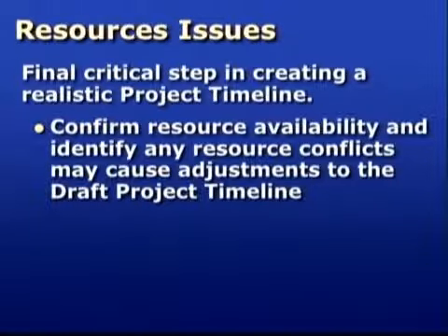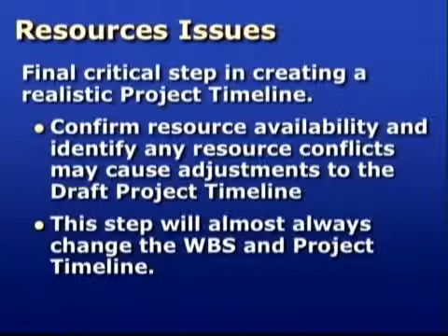You can also use spreadsheets to show timelines. They must contain task start dates, end dates, and milestones. Use whatever method works best for you to show how project tasks will be accomplished over the course of the project. A critical step in developing the project timeline is to verify that the resources needed to accomplish the tasks will be available when the draft timeline shows they're needed. When I use the term resources, I am including people, facilities, and equipment. In my experience, this step will undoubtedly change the timeline due to resource conflicts.